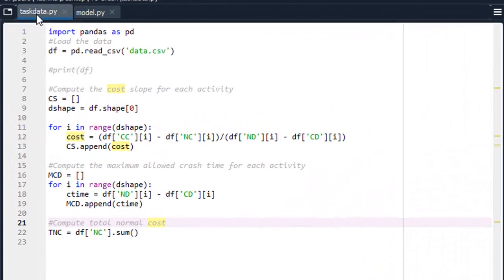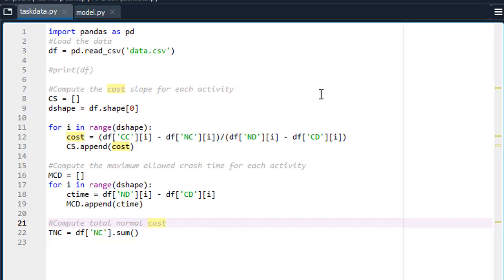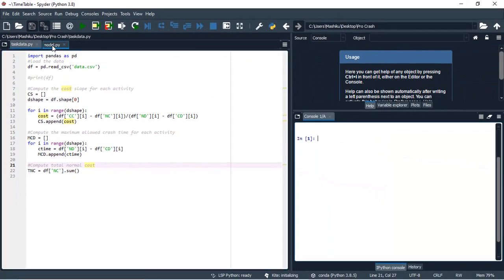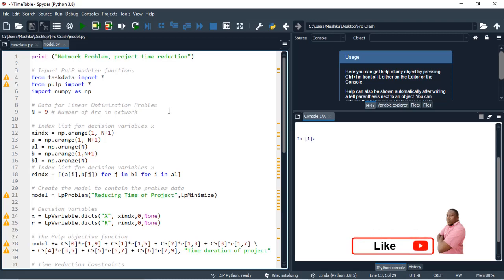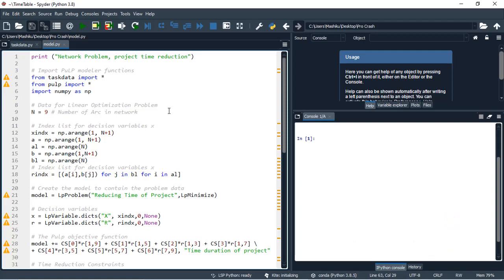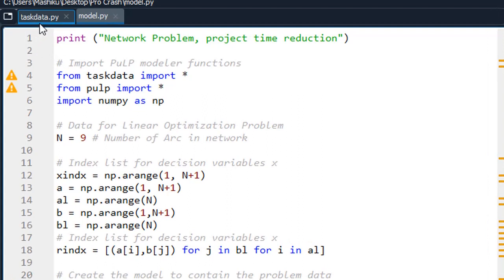I have prepared two Python files: the task data file and the model file. In the task data file, I loaded the data from the Excel sheet in CSV format. I did this to avoid manually computing the cost slope, the maximum crash duration for each activity, and the total normal cost. From this file you can find the computation of cost slope, maximum crash duration for each activity, and the total normal cost from the data frame. The model file comprises the whole LP model for our project crashing, and I imported the task data into it.